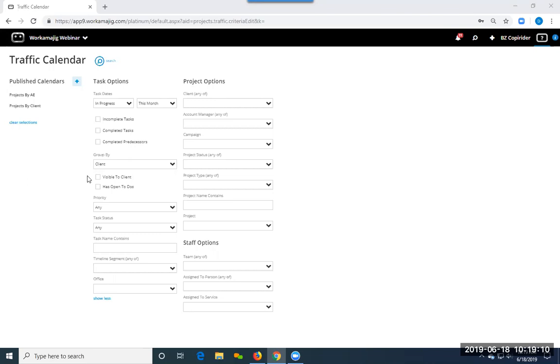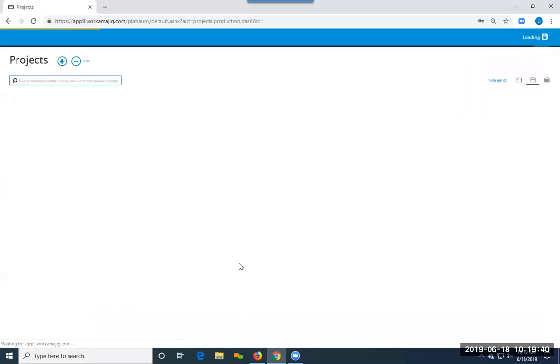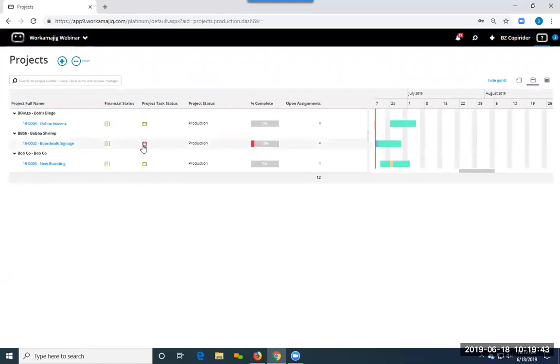Oh, I see. So you're saying, can I see past due tasks on the schedule? That goes back to, instead of it being back in the past, I can't work yesterday. So the better idea would be that we let the task due date push right forward because it has not been completed, which would then affect your schedule. And that schedule being affected would, of course, affect the timeline itself. And so a project would suddenly be in the red, right? Because there's an issue with the schedule.